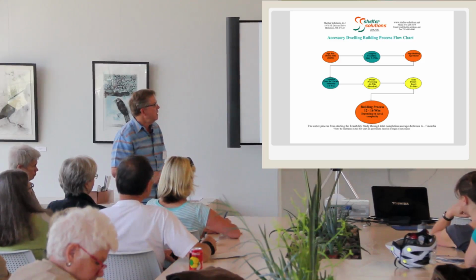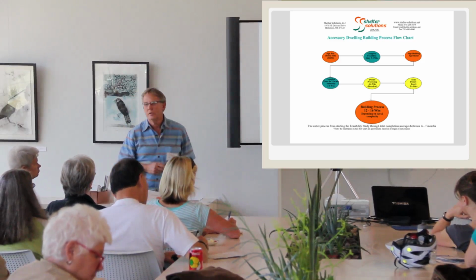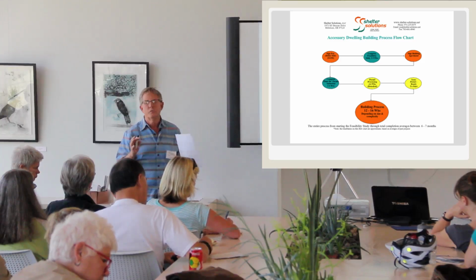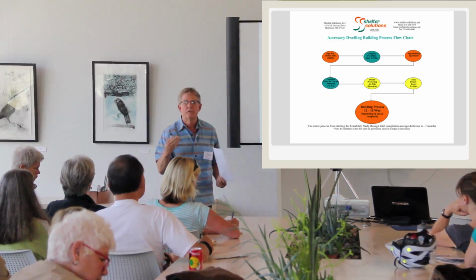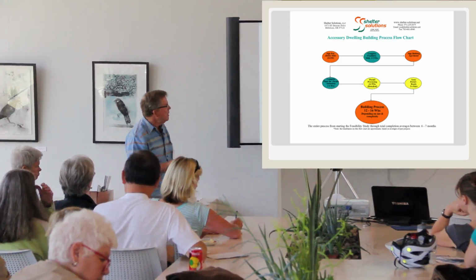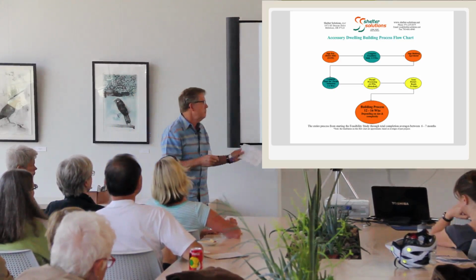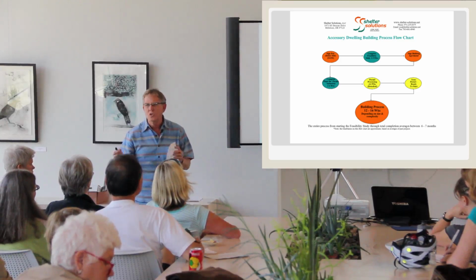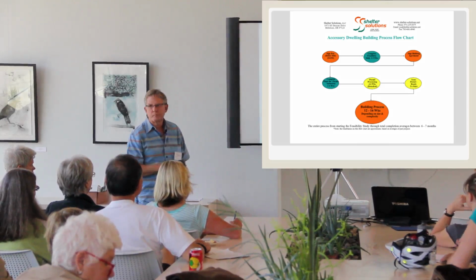With most of my ADUs, they range from 12 to 16 weeks building time. An 800 square foot ADU with not a bunch of unusual situations to deal with, I would tell the customer allow 110 to 120 days, and my target would be 100 days. And I usually hit my target. So the whole process, from the time you're thinking about it until the time it's completed and ready to use, is about 6 to 7 months.